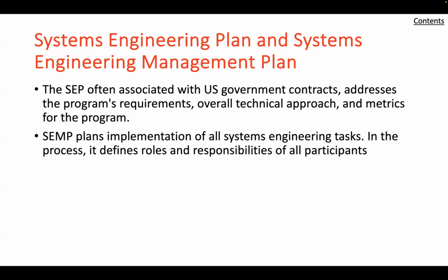So does one need a SEP or a SEMP? That's a question that we want to address next. A SEMP should be developed by the prime performing organization, by the senior systems engineer, for all new program development. For a government contract, a SEP is acceptable only if it addresses the overall program systems engineering technical approach across the government, prime, and subcontractor domains. Typically, a SEP may not flow down the systems engineering process and requirements to all program subcontractors and vendors.